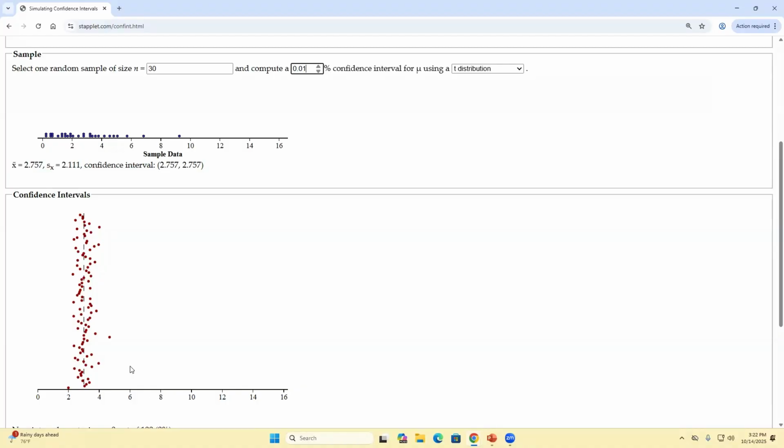So if Dr. Rivera told Alex, hey, I need to know exactly how long this is going to take, Alex would say, hey, my best guess is 21 weeks, and I guarantee you that's wrong. Because it could take 21 weeks, or it could take 21 weeks and 2 days, or it could take 19 weeks and 5 days, or it could take 21 weeks and 20 minutes, right? You can't get that confidence interval down to a point. Because if you have a single point, you lose your margin of error. If you lose your margin of error, you completely lose your confidence.